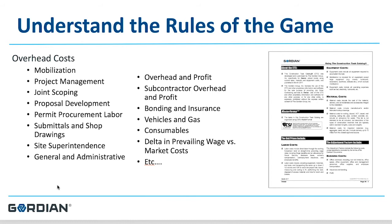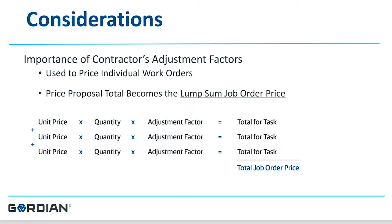Think about all the general condition expense it takes to manage a project — that expense needs to be in your adjustment factor. The importance of your adjustment factor is that it is used to price individual work orders; the price proposal total becomes the lump sum job order price. The price book formula is: unit price × quantity × adjustment factor = total for each task. All tasks are added together to give you the total job order price.